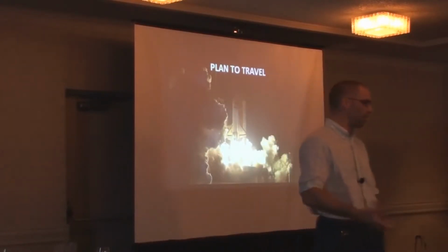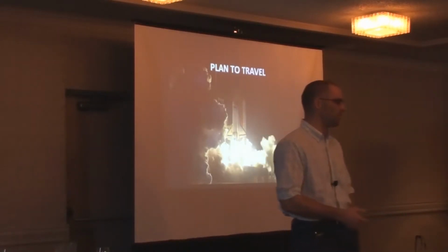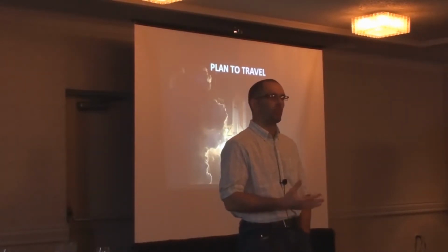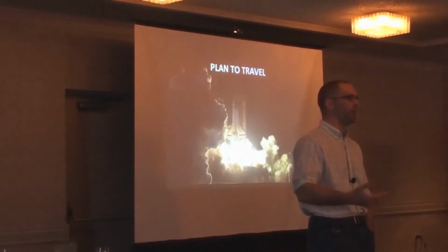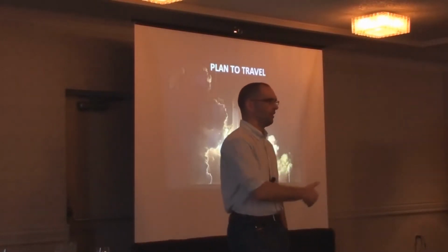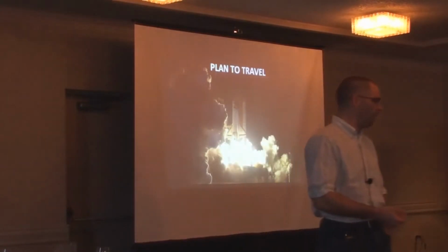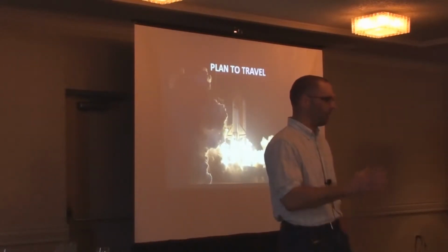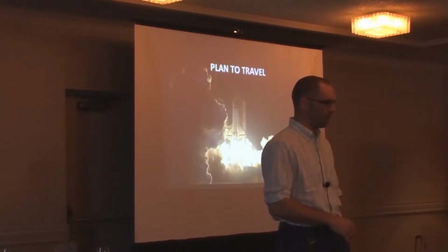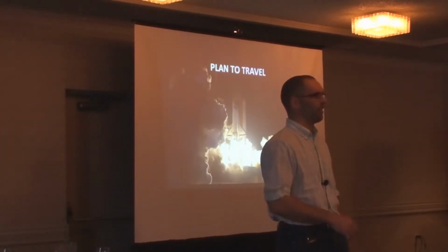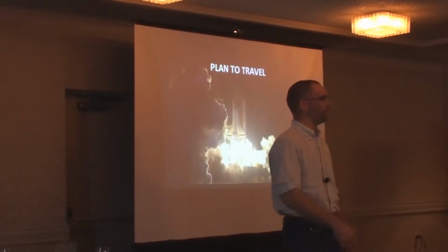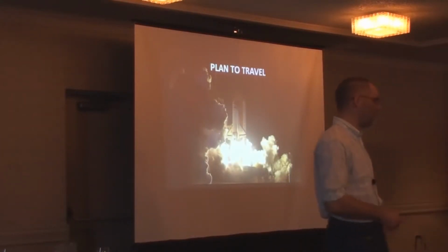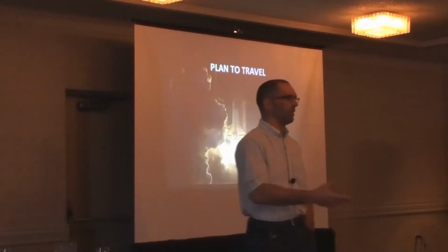We typically try and bring people in regularly at key points. For instance, the developers I have in Argentina typically come up for 1 or 2 weeks every 6 or so, and we tend to cycle it. So they might not all be there, but there's normally someone from that office in Buenos Aires in the room. And that also builds trust, right? I'm sure the guys in Argentina will be on the phone, and one of the Microsoft people in Redmond will say something, and they all kind of nudge each other, and then I am their guy who's in the room to say, was that all crazy talk, or were those guys really serious? Because he's the guy they trust. He's their guy, right? So it allows you to build that trust bridge across the two teams.